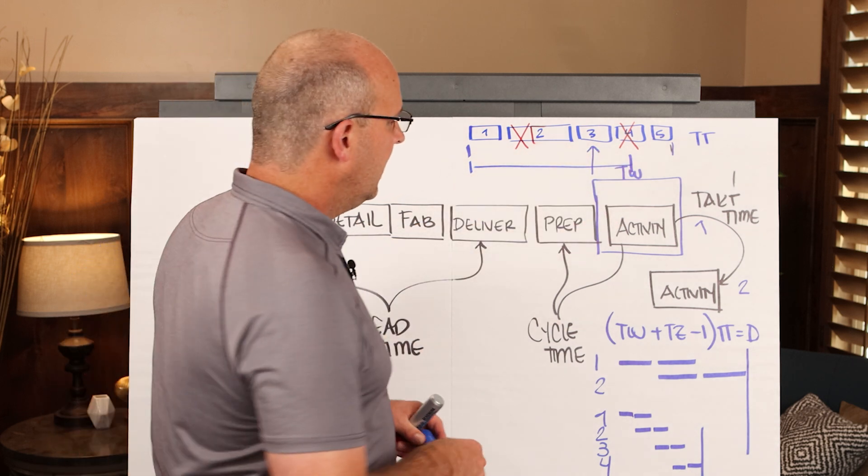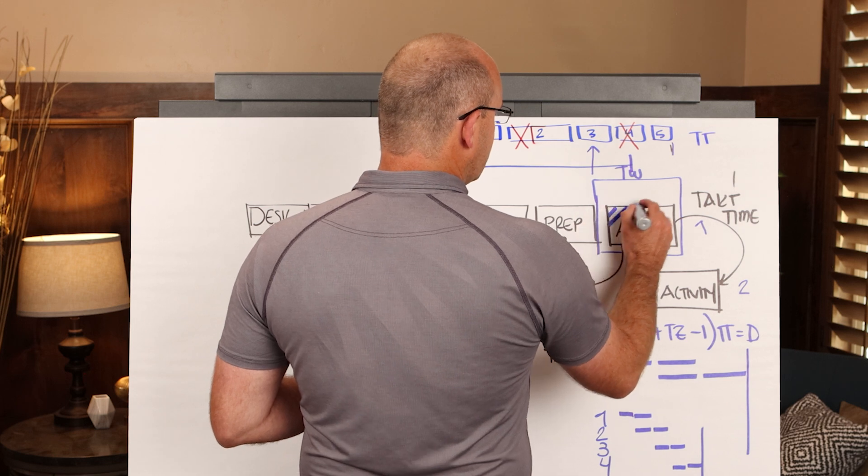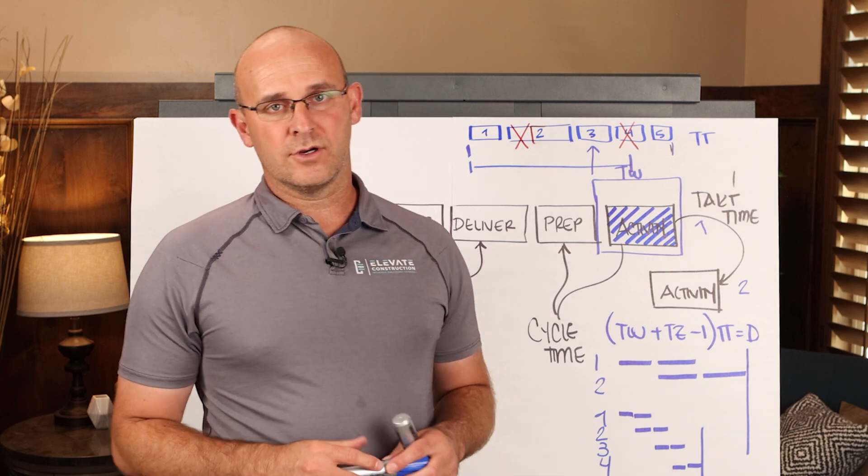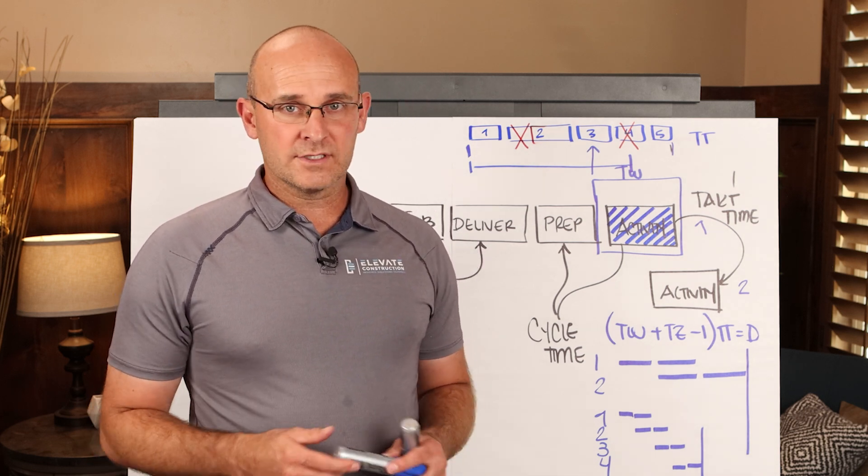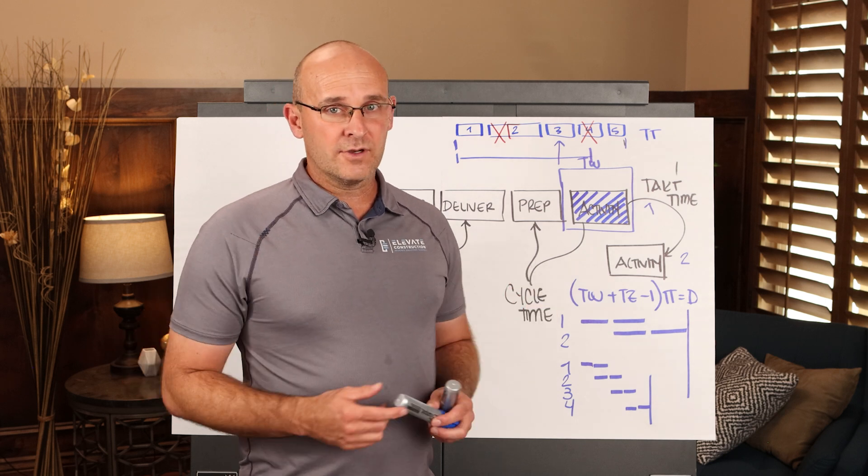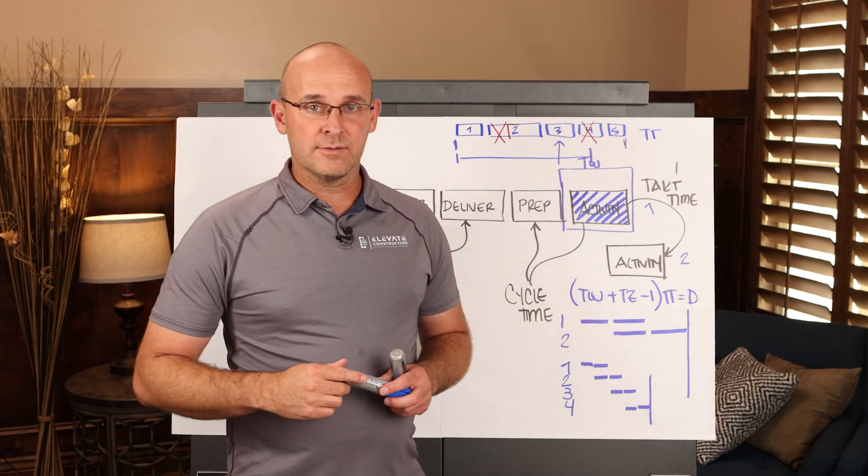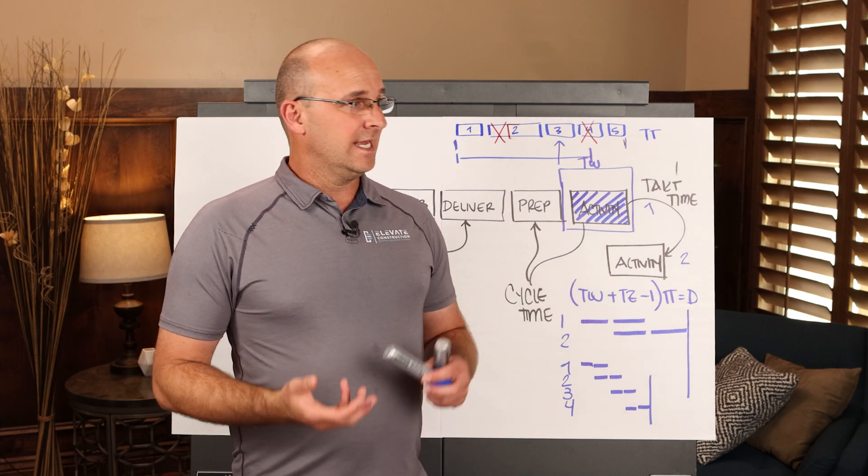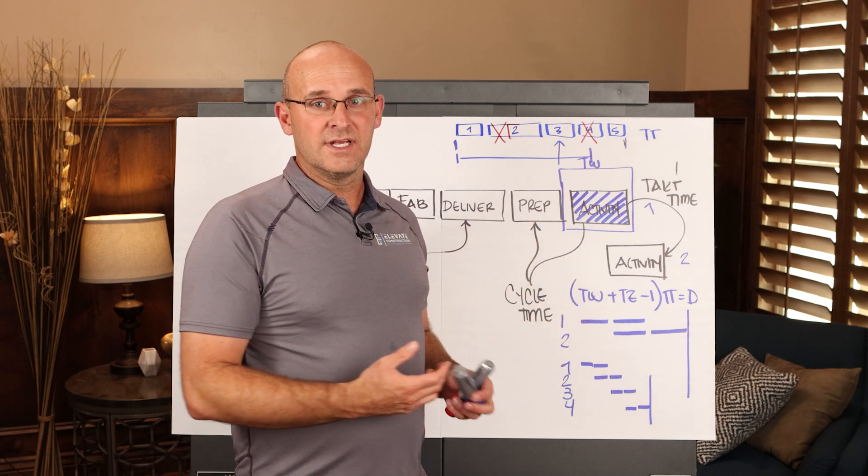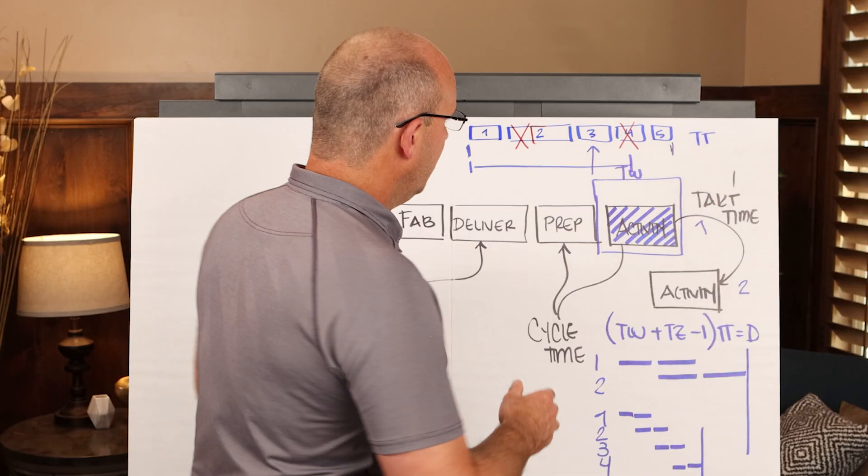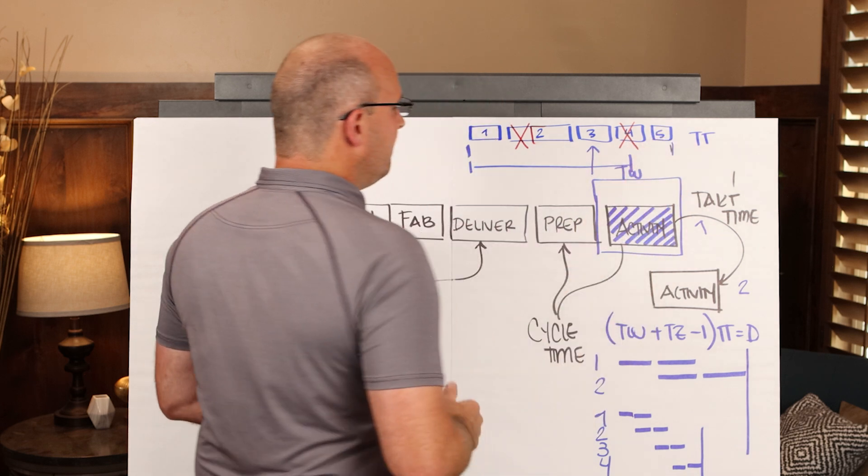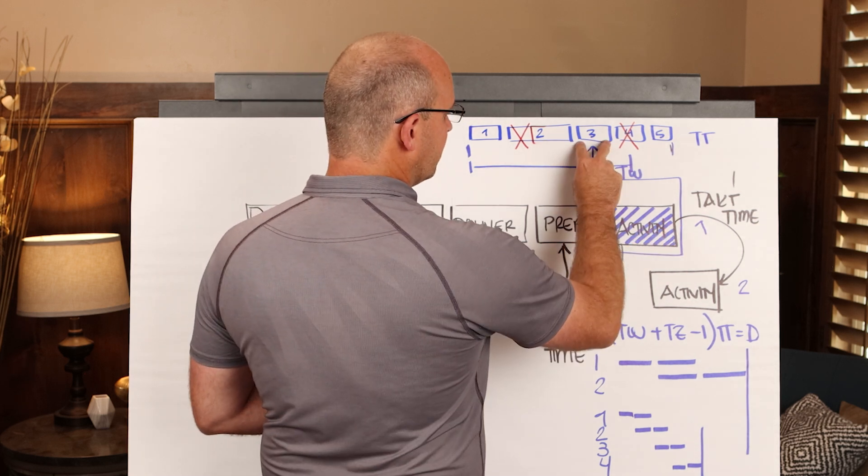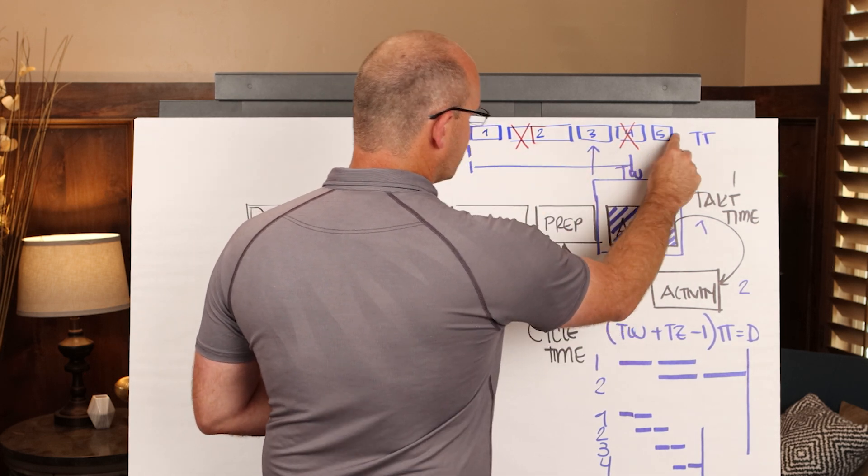You're probably like, Jason, this is pretty common sense. The problem is in construction, we're only ever focused on the activity duration. We're only ever focused on how fast is the worker going? How fast is the install going? We're not focused on how long it takes to get them the information. We're not focused on how long it takes to mobilize. We're not focused on how the crane held them up. We're not focused on how long it takes them to move from area to area, any wasted steps, any roadblocks, any interruptions, any missed handoffs, any impacts, any delayed materials, right? If we look at the whole thing from start to finish, we can start to analyze waste because the production on our project sites is not just from this activity time right here, okay? It's the overall cycle time.